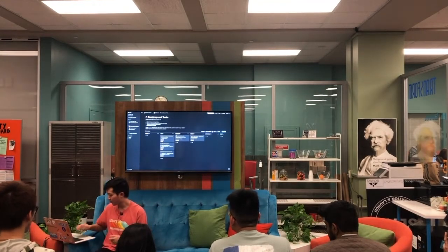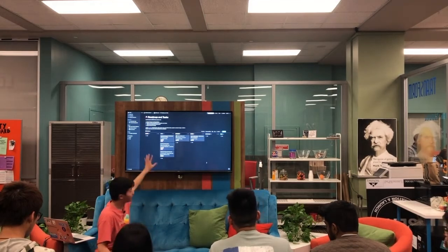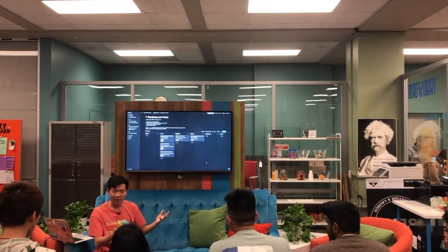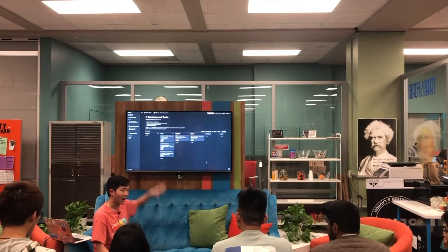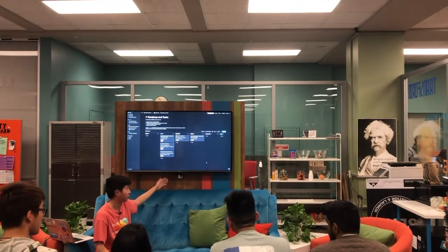Cool. And let's walk through the rest of the board. It's pretty self-explanatory. Backlog, as I said, once you break down an epic, all the stuff goes there. That's everything for that feature. To do is what your team is currently doing for the week.